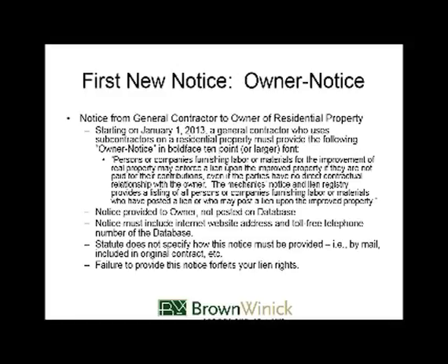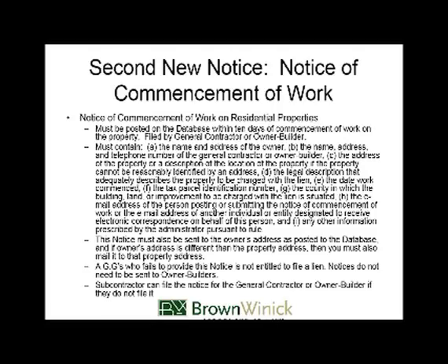Now, this is one of those owner notices that if it's not provided, the statute says you forfeit your lien rights. So for all the builders out there, it's a big issue, and it's something you need to have and need to include. This notice requirement started on January 1st, 2013, and continues to today. So it is something that needs to be provided, or you're going to lose your lien rights.